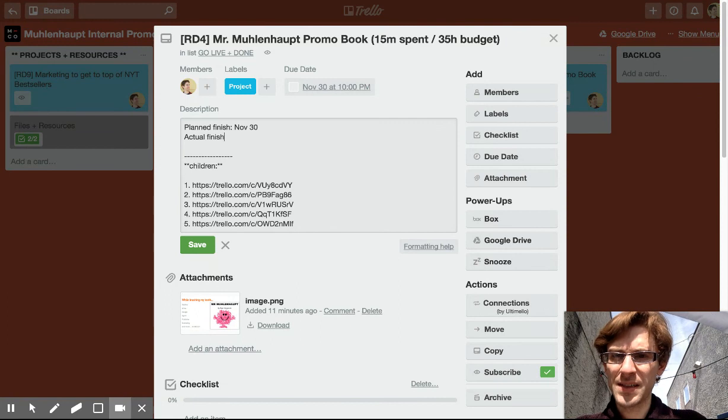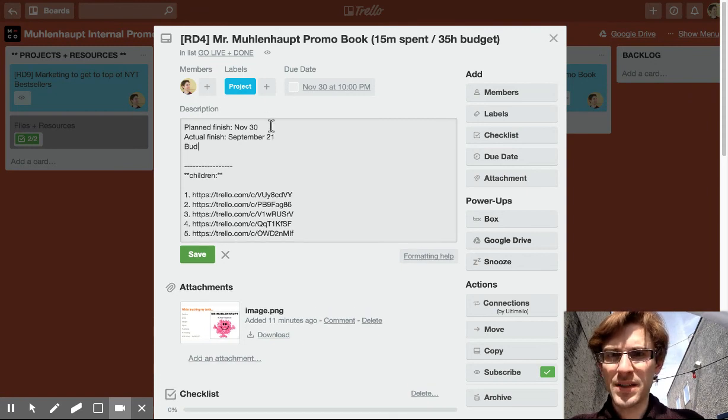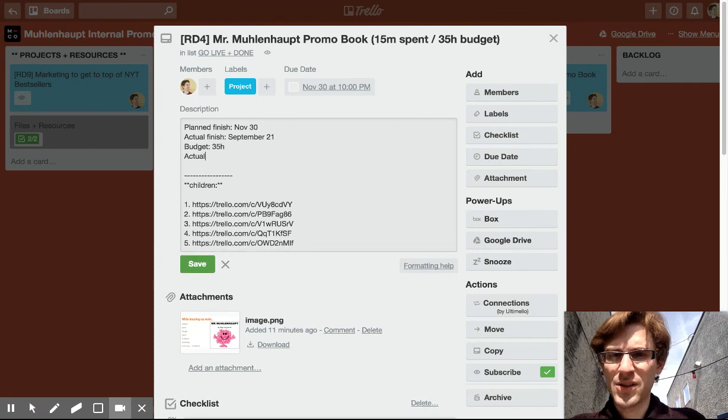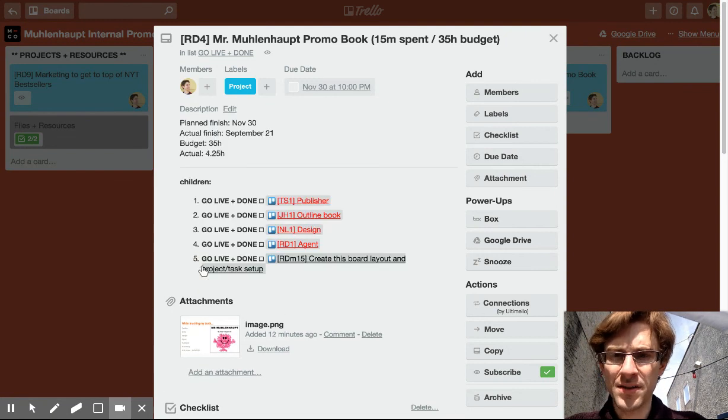Actual finish was September 21st. Budget was 35 hours. Actual was probably about 30 minutes, but let's just say it took all 4 hours that we had reevaluated to 4.25 hours. 4 hours, 15 minutes is fine too.